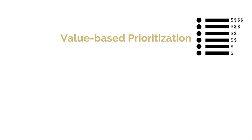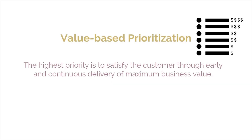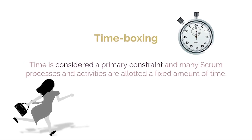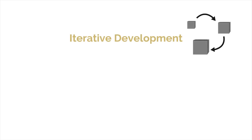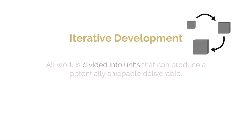Value-based prioritization, in which the highest priority is to satisfy the customer through early and continuous delivery of maximum business value. Time-boxing, in which time is considered a primary constraint and many Scrum processes and activities are allotted a fixed amount of time. And iterative development, in which all work is divided into units that can produce a potentially shippable deliverable.